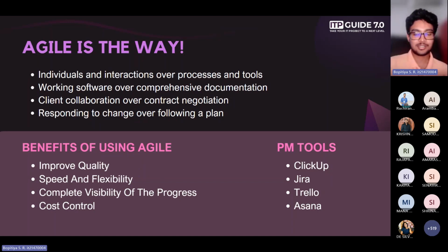Basically, the tasks that need to be done, you have in the to do column, and if you start the task, you can move it into in progress. And if you have completed it, you can move it into completion after the review processes and everything is done. You can have an additional 4th column in between in progress and completed called under review, but that's mostly for development sort of projects. But yeah, you can take a look at those.